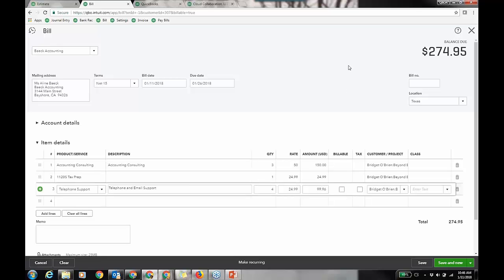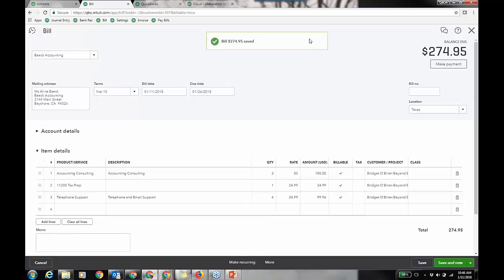However, they already accepted the estimate, so I'm not actually going to be creating, I'm going to create the estimate from that, either progressively, depending if you have that feature or not. I'm going to turn billable off because there's no default setting for that. But I just want to tag this for the profitability of the job or the project or the sub-customer. I'm not passing it through, right? So that's important to mention. So I'll have that bill there.